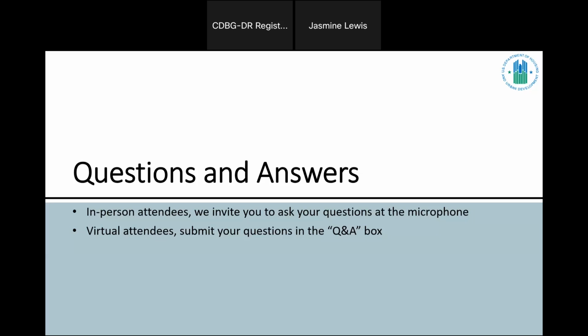So the role of the consultant is to help prepare the environmental review record. However, they cannot carry out consultations. So when it comes to the Section 106 consultation process, it is the responsible entity that would need to be the one engaging with the state historic preservation officers, any tribal parties, and carrying out the consultation initiatives. The consultant can help prepare documentation, but they cannot initiate consultation.